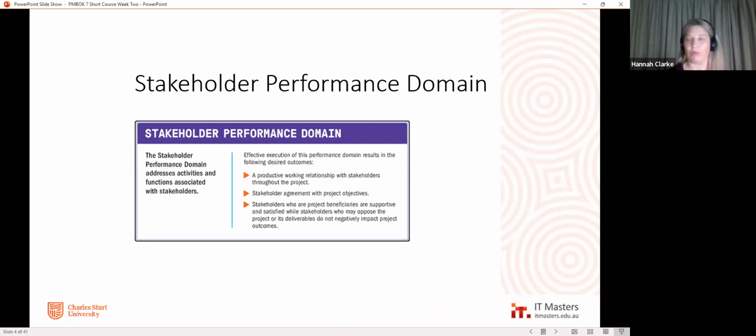And therefore, all of the time and the money and the resources that we've put into creating this product effectively become wasted. So we really need to make sure that we're giving our stakeholders the optimum opportunity to get involved in the project and to bring all of their knowledge and their skills and their information to the project nice and early. One of the issues we can have with stakeholder engagement is when stakeholders are engaged too late, and they do have the information and they come forward with it, but it's after certain components of the product have been built, and so therefore it's of limited value. And sometimes we might even have to scrap things and start again. So in order to avoid that, we need stakeholders to speak up.